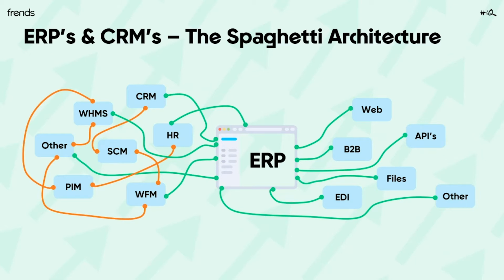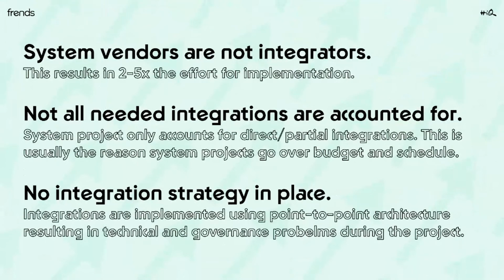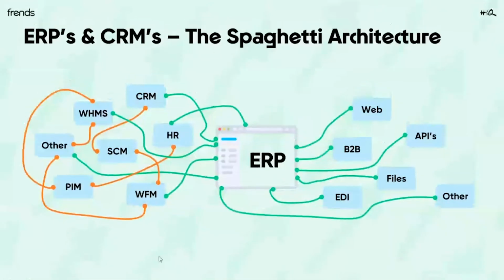And maybe to highlight and summarize this in a couple of sentences, the core problem here is that usually when you are approaching projects in this manner, the ERP or system vendor will quite often suggest that, yeah, we'll do those integrations, and they bake that integration work into the implementation estimate that they give you when they are running that implementation or rollout project for the system. But the matter of fact is that system vendors are not integrators.